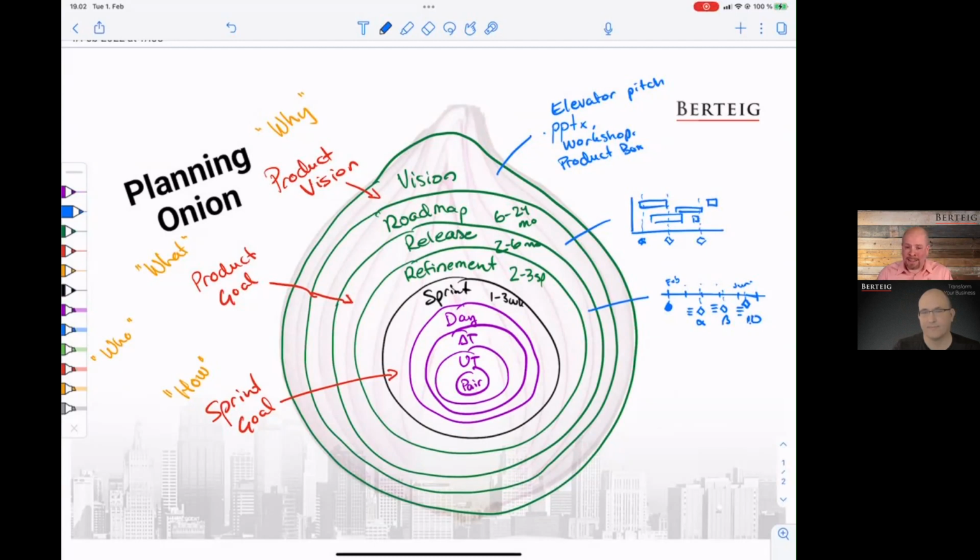And now we already can see pretty well how much time we have for various things. When should things be ready? How are they connected in time? And also intermediate planning horizons. So now we know. Yeah, and take from that, the other thing is those little lists for each of those pieces can then become part of, for example, the initial version of a product backlog. Yes, absolutely, absolutely. If we don't have it already, those definitely are items in there.